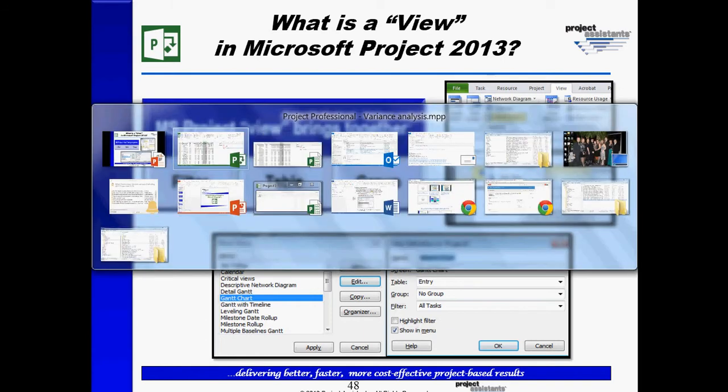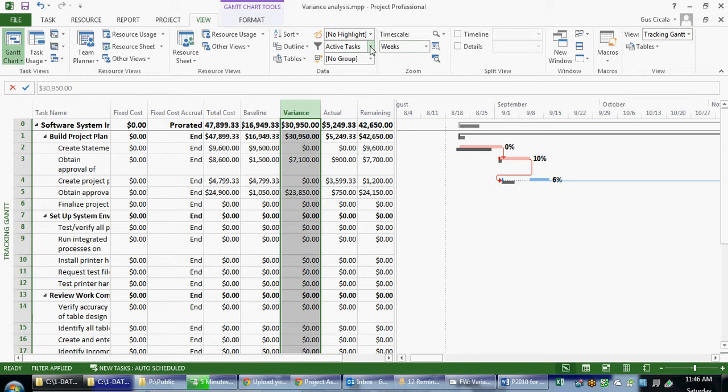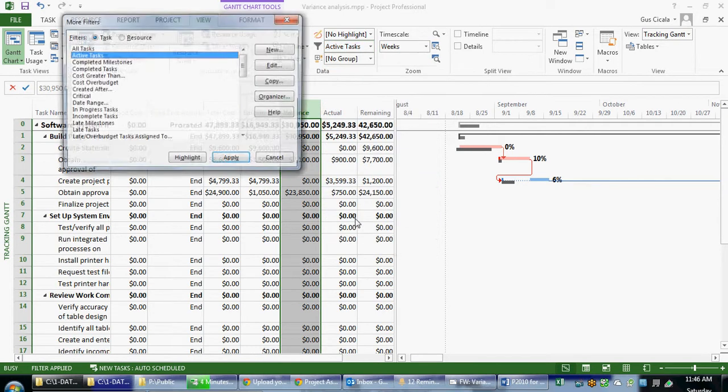Let's take a look at how this works in Microsoft Project. When I click on the view tab of the ribbon, I can apply a filter called work over budget. Now you'll notice that's not in the menu, so let's go to more filters.